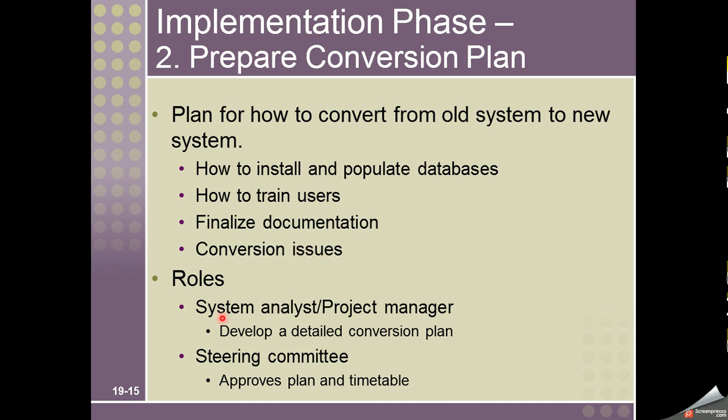We'll see shortly. The role of the system analyst or project manager is to develop a detailed conversion plan, and the steering committee will approve this plan and timetable because the users need to be freed from their work. So we need to make a plan and a timetable for giving training to the users.